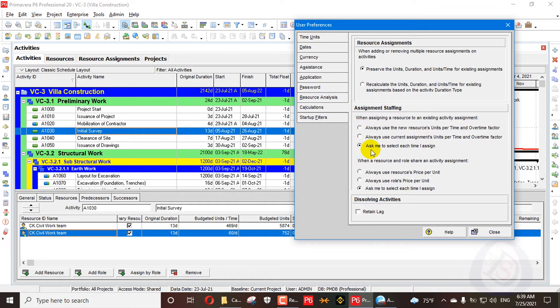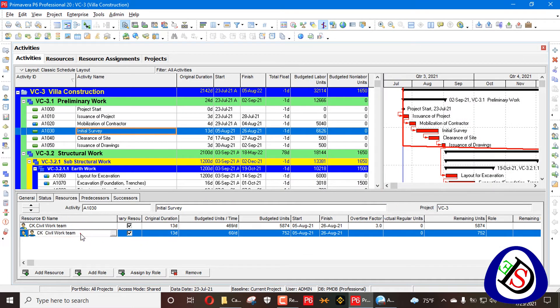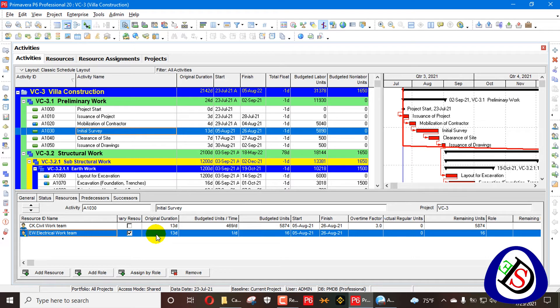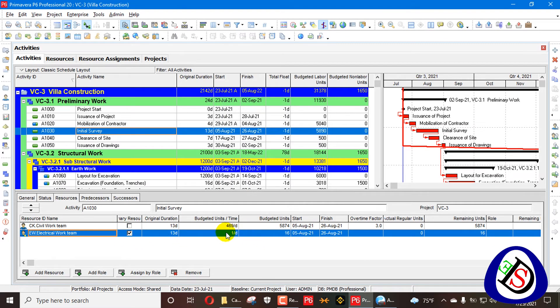In User Preferences, the option 'ask me to select each time I assign' means it will prompt every time. For example, if we select 'always use the new one' and say always use the new resource — don't show the dialogue box when adding or changing staffing — it will select that setting. Then when we change a resource, it will not ask any question and will directly change.